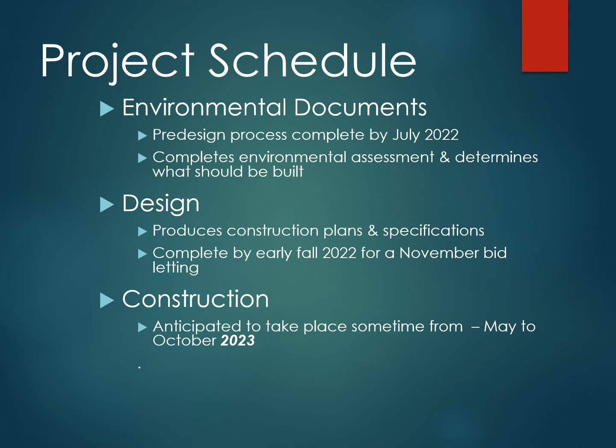The design of this project, which produces the construction plans and specifications, will be completed by the early fall of 2022 for a November bid opening for the North Dakota DOT. The construction for this project is anticipated to take place sometime from May to October of 2023.